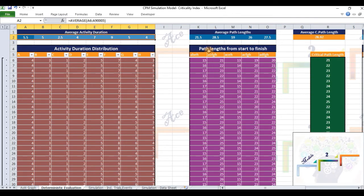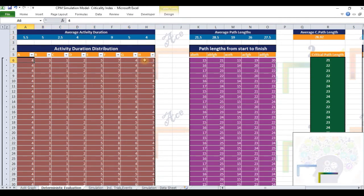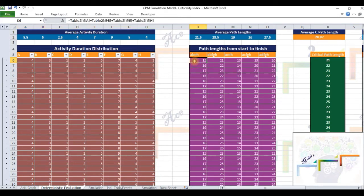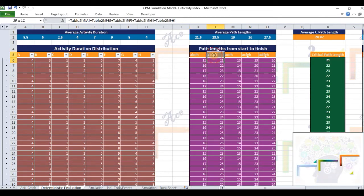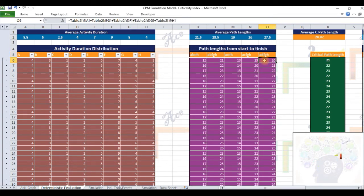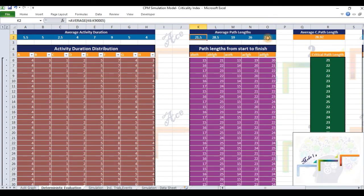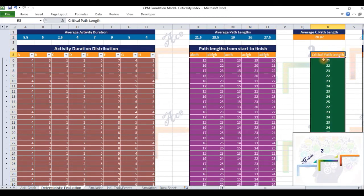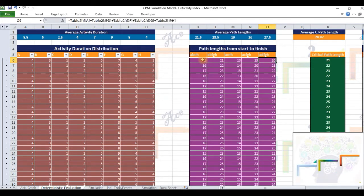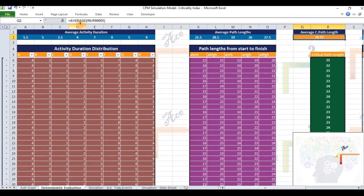For each combination or set of activity durations, the model computes the lengths of the possible paths from start to finish: A, B, E, H; A, B, F, G, H; A, C, E, H; A, C, F, G, H; and A, D, F, G, H. Row 2, columns K through O give the population mean of these path lengths. In column R, the model computes the length of the critical path, which is the simple minimum of the path lengths computed in the same row of the previous table. The model calculates the population mean of these values in cell R2. The rows in the critical path length table with column R values less than the mean in cell R2 are color coded in green. Values exceeding the mean are shaded in red.